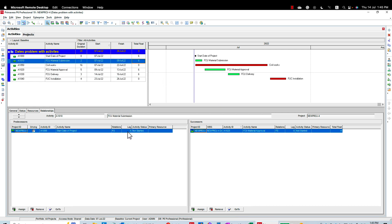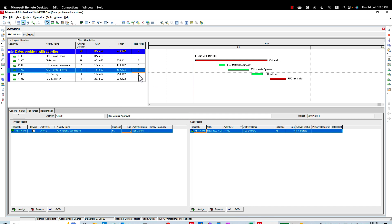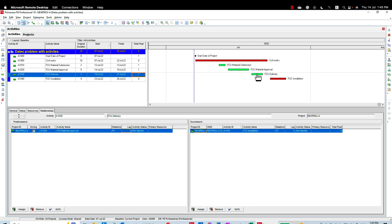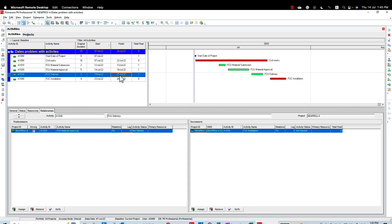Is to move this material submittal, let's say by five days. By doing this, as you can see now, the material submittal was shifted and I have only one day float because this material will be delivered 21st July and I need the installation 23rd July. This is one method.